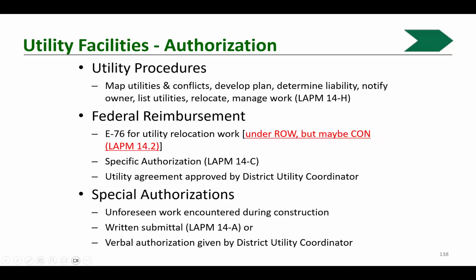I think as it relates to the right-of-way part, if you're working on Caltrans right-of-way on the state highway system, if your project goes off your local road and onto the state highway system, then you're going to have to follow the Caltrans right-of-way manual for the work that's on the state right-of-way. Yes. If it's on your local roads, whatever the classification of that road is, but it's your own local roads, then you follow what's in our LAPM.